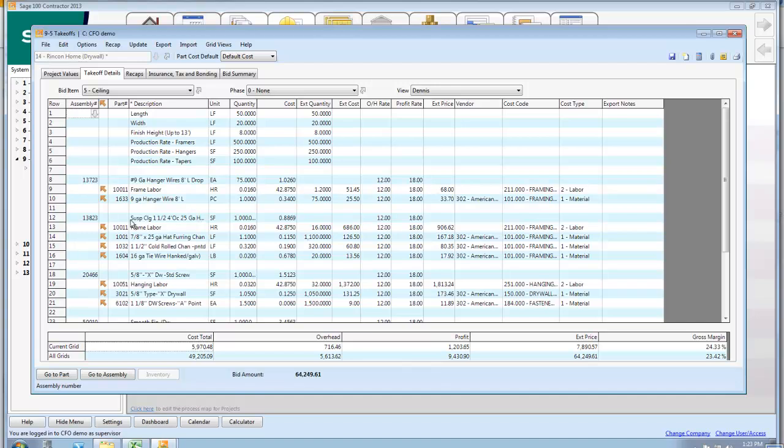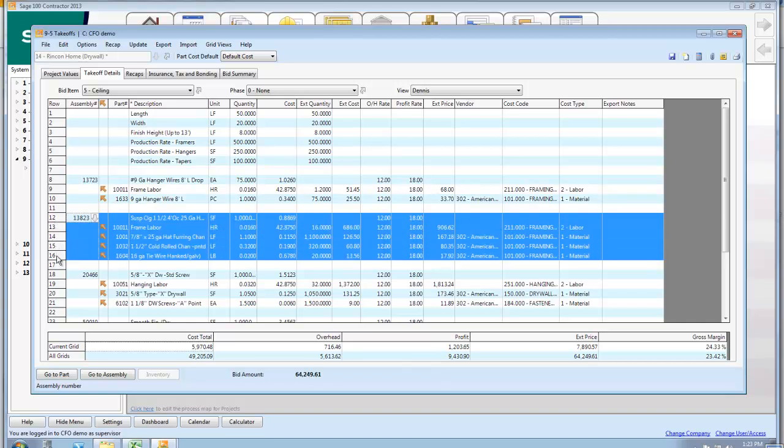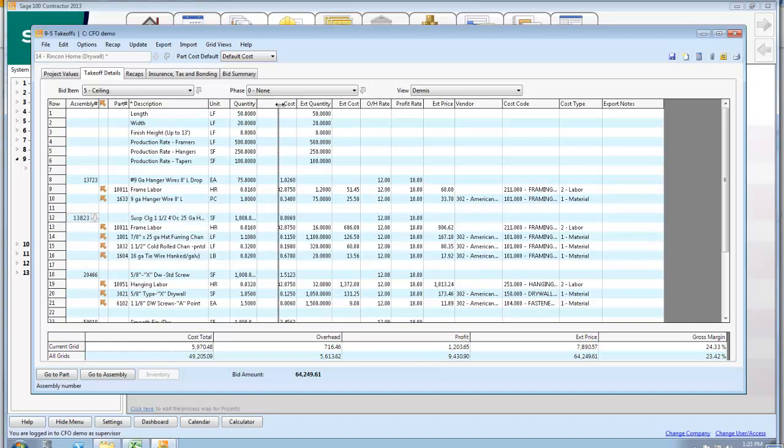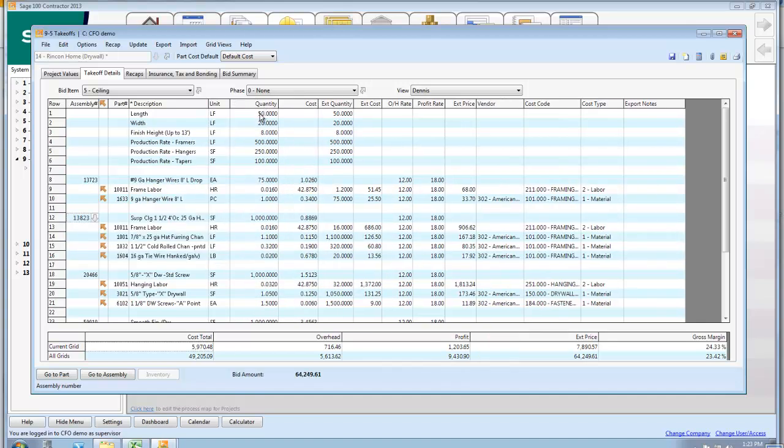So if I'm doing, instead of looking at the wall in front of you, just look at the ceiling above you. And this is suspension ceiling. So we entered some numbers up here, kind of like you would in Excel, length, width. So we came up with this formula that fills this in: 1,000 square feet. And according to my math, I need 0.016 man hours or woman hours for every square foot. I need 1.1 of these, I need 0.32 of these, and I need 0.02 of these.